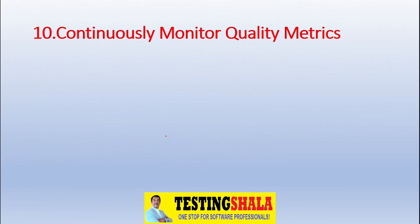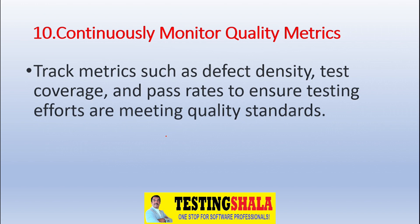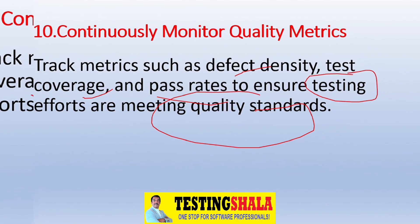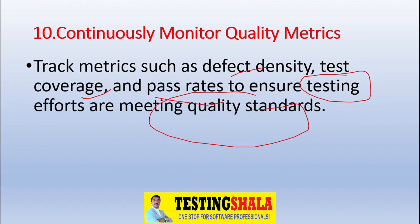The tenth method is continuously monitoring quality metrics, which helps guarantee delivery within a tight schedule. We should keep tracking testing metrics like defect density, test coverage, and pass rate to ensure testing efforts are meeting quality standards. Monitoring these metrics helps ensure we can meet the delivery deadline.